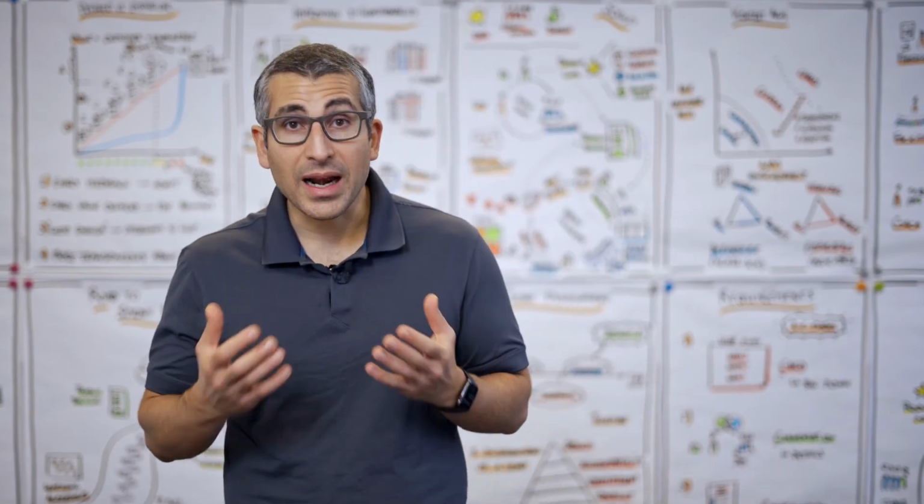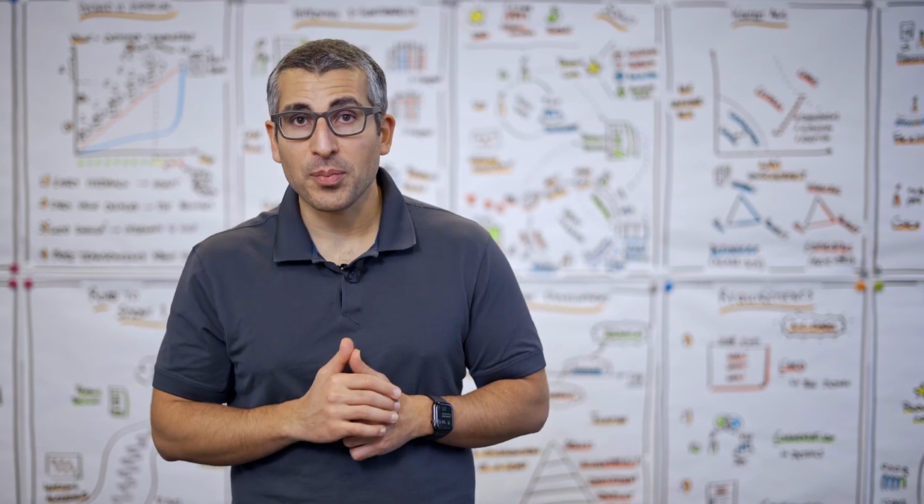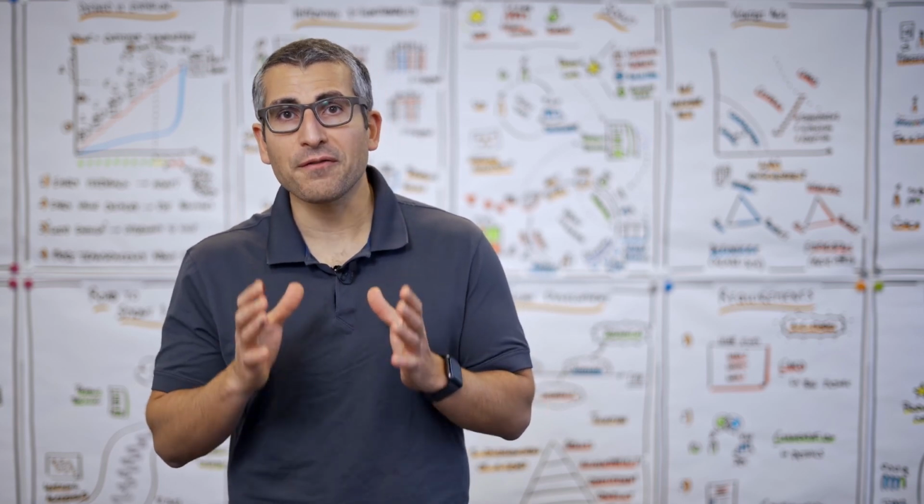The Scrum Master facilitates this event very actively, and there are various approaches to do this. One approach that I like a lot is a 5-step approach towards running an effective retrospective. Step number 1, setting the stage, which basically means you make sure that everyone knows what we are going to talk about in the next 45 minutes, 60 minutes.